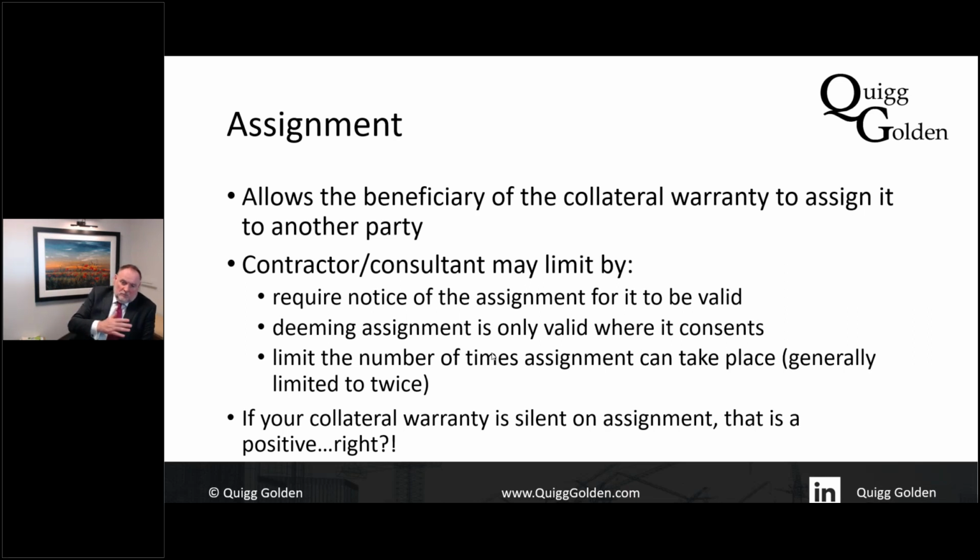that warranty. So in other words, the promise is no longer to the developer. He won't have an interest in the property, but the promise is going to go towards the owner of the property. And that's really important. Otherwise, imagine the piles fail, and if the warranty hasn't been assigned, the developer goes to sue the subcontractor, but the subcontractor says, well, you suffered no loss because you don't own this building anymore, so you can't sue me for anything. You've got no loss. And the owner of the building, the new owner, can't sue the subcontractor because there's no collateral warranty in place.